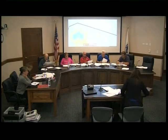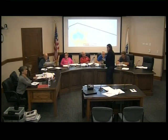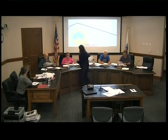My only concern is that the prior plan did not propose the 8-foot-high retaining wall that runs 80 feet along the rear property line, or the grading. And I started to think that maybe that fell outside of a modification request and needed an amendment. But again, that's up for discussion. I have a clear overlay of what was approved. If you want to overlay that to the plan I handed out, just to give you an idea. Oh, we already did it. If you line up the BBW flags, you'll get a better sense of the changes in front of you this evening.